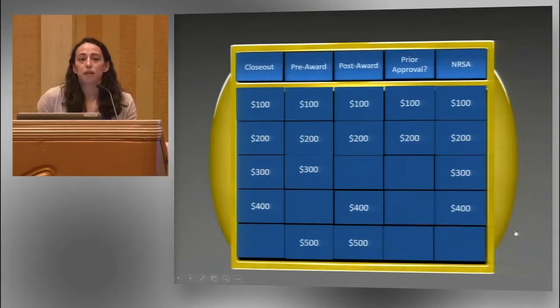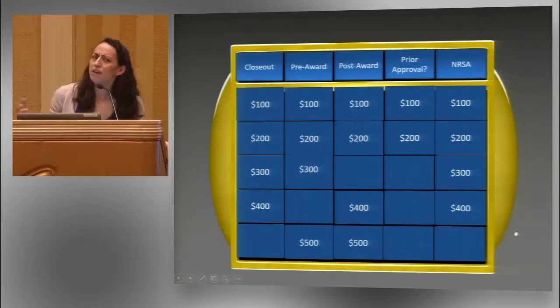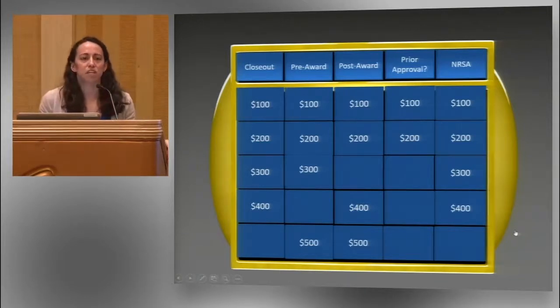Sorry, you stated unless it's significant. So rebudgeting that's more than 25%. Okay. Things like equipment that's more than $20,000, the bigger, significant changes, or if it is a change in scope. Thank you.